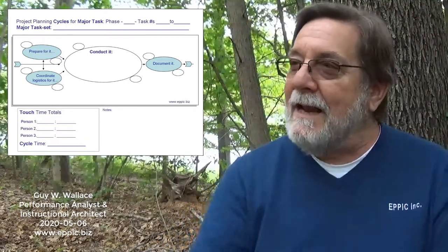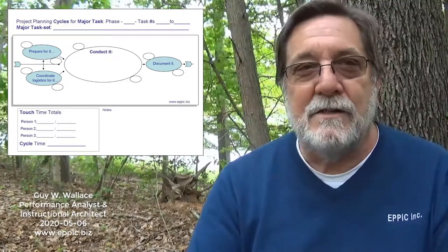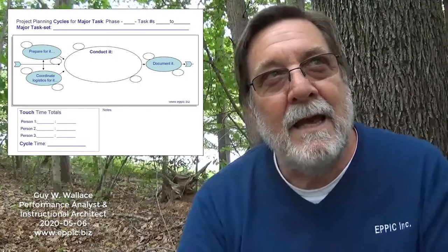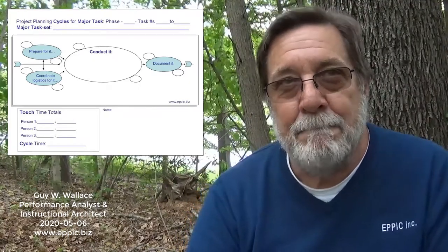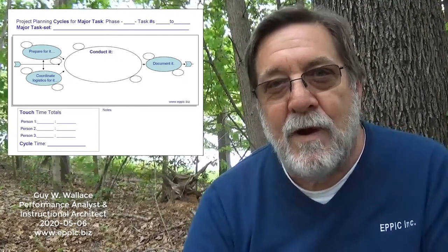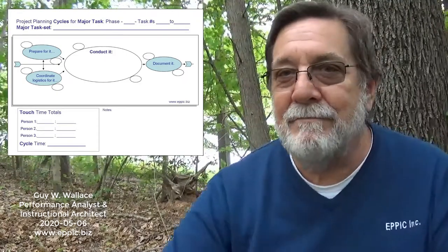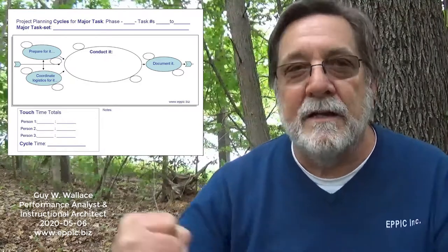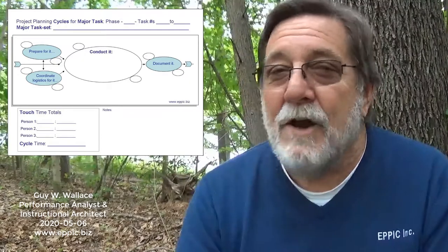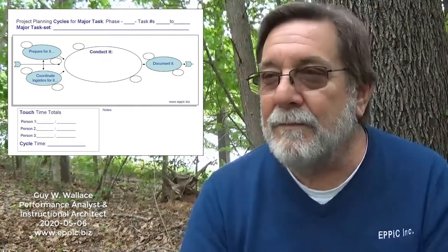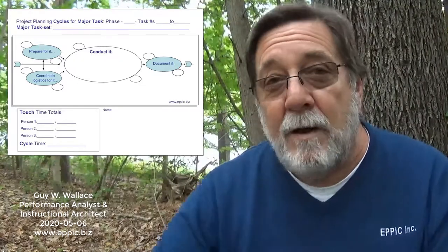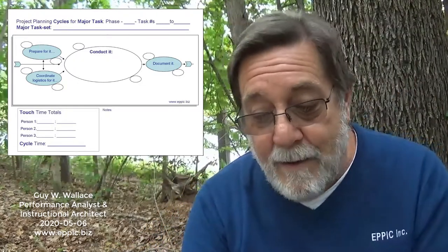One of the things that I've noticed throws projects off schedule is that people didn't contemplate, didn't anticipate, and didn't plan for all of the other tasks that surround the primary task of conducting some activity, like running analysis team meetings. My clients didn't always understand this, so I would jump up on their whiteboard and draw a bunch of these circles and say, here are the primary tasks. They would all understand that, and then I would go back and draw these other circles.